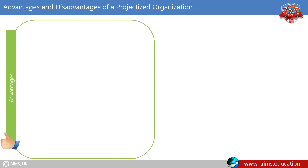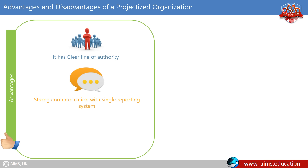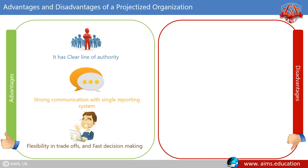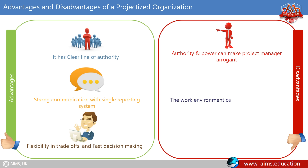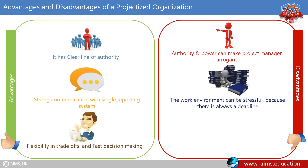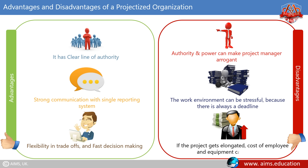The advantages of a projectized organization are: a clear line of authority, strong communications with a single reporting system, and flexibility in trade-offs and fast decision-making. The disadvantages are: authority and power can make the project manager arrogant; the work environment can be stressful because there is always a deadline; and if the project gets elongated, the cost of employees and equipment can go higher.